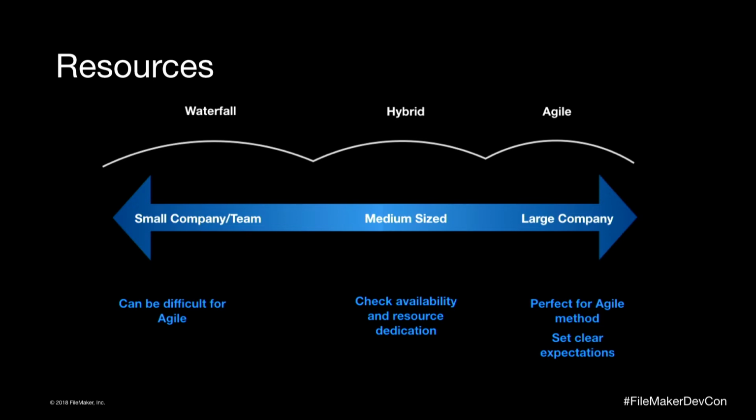But what we want to do is focus on how we can make our constraints work for us and be Agile. So if you can find somewhere in the middle in these situations where you have a team where you only have the necessary subject matter experts that are needed for your team to drive it forward, that's the win-win. That's your sweet spot of Agile. But you need to make sure that you also have the right people in the team. It's not only just the subject matter experts. You should also probably consider having the person on the team that actually writes the check so that you know that what you're building is actually going to get paid for at the end.